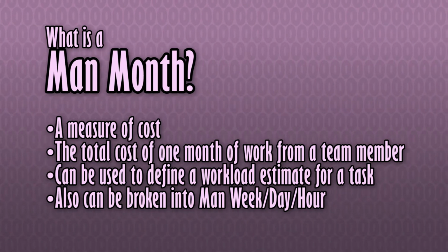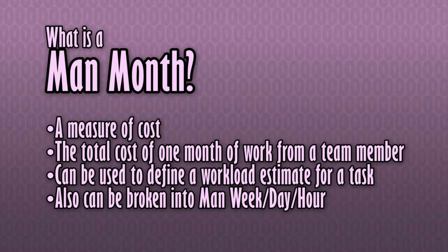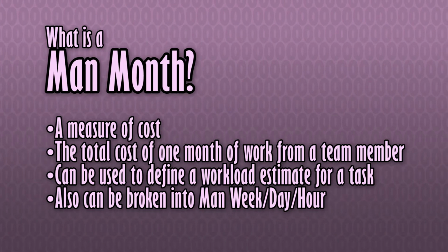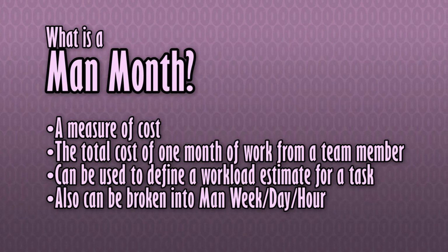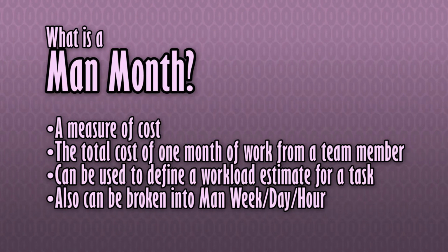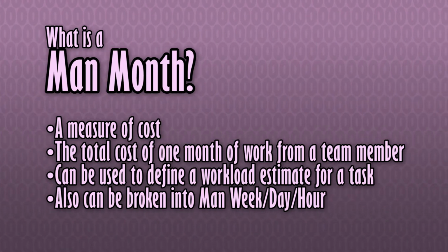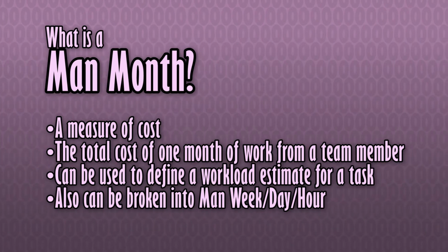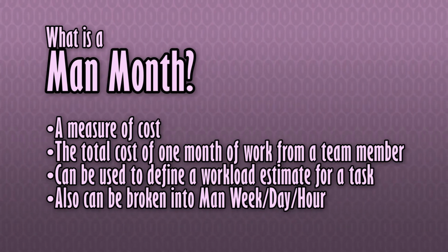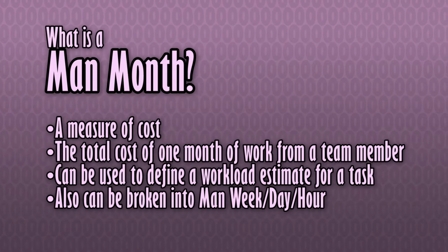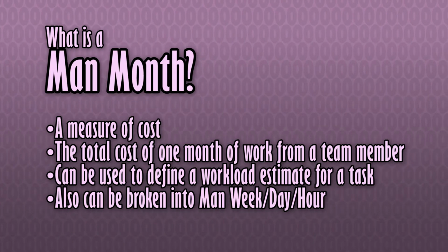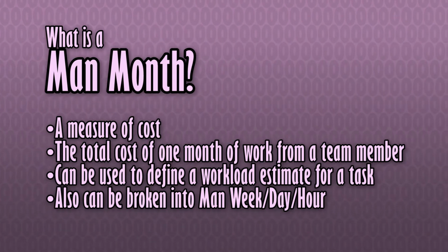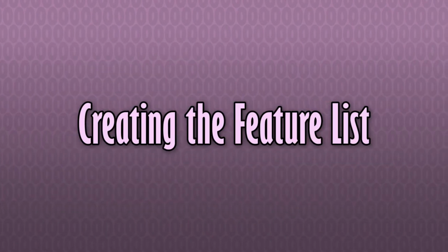The month can further be broken down into man-weeks, man-days, or man-hours. This also means that a task that can be tackled by multiple people at once can accrue multiple man-months of work in the span of a single real month, so it behooves you to remember that one man-month of work does not equal 1 month of real time. Got it? Good. If you don't, the aforementioned video will hopefully help shed some light on the subject. Back to the task at hand, however.